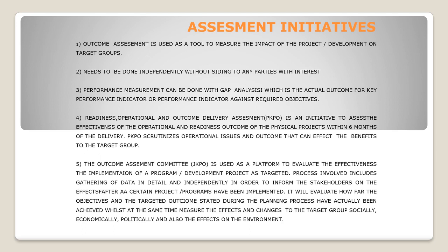Readiness, Operational and Outcome Delivery Assessment (PKPO) is an initiative to assess the effectiveness of the operational and readiness outcome of the physical projects within 6 months of the delivery. PKPO scrutinizes operational issues and outcomes that can affect the benefits to the target group.